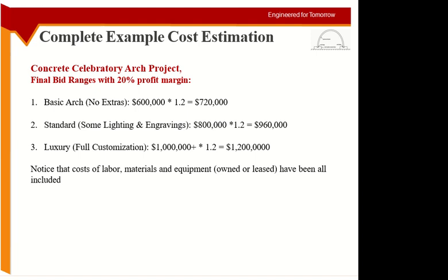Why? Because when you are going for a fully customized project, you are also increasing the expectations and requirements of the client. Higher the service, higher the expectation. So you may be targeting more profit, but at the same time, you are also giving the client a chance to be unhappy with you in more than one way. So this is a risk which you should think about when selecting these options.